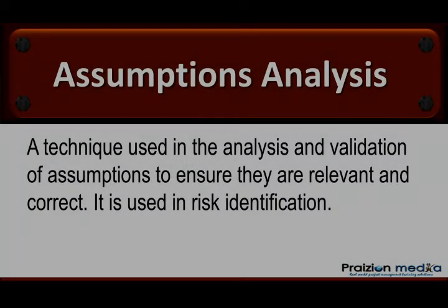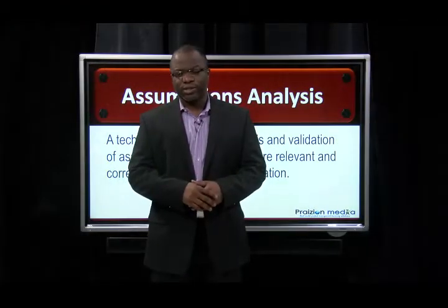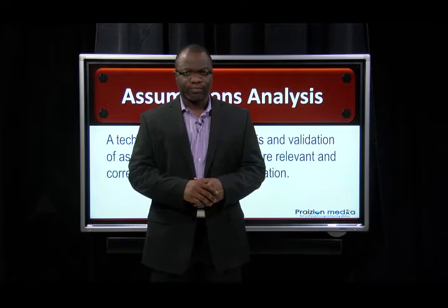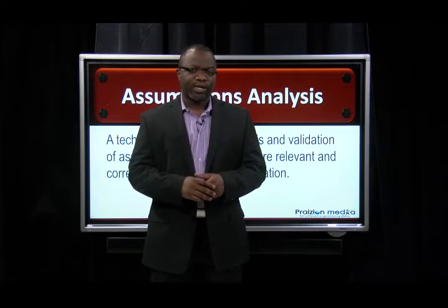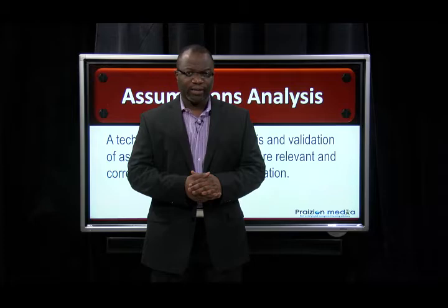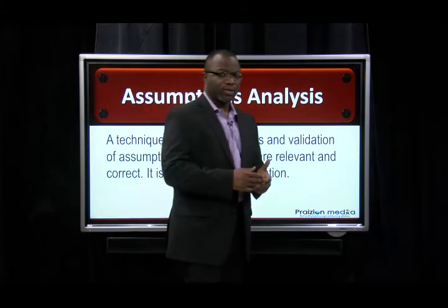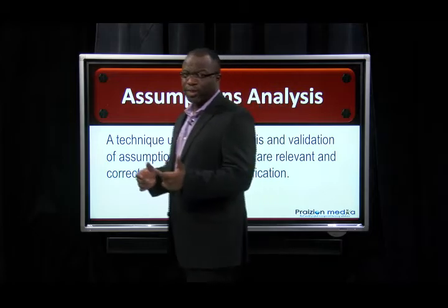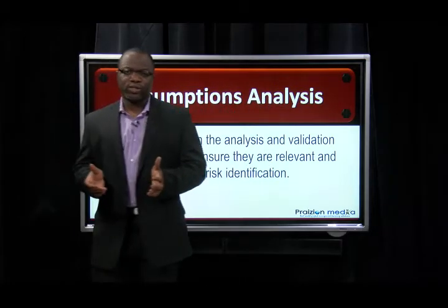Assumptions analysis. Assumptions analysis is an analysis of assumptions that are documented in the project scope statement. Remember, your project scope statement is part of the scope baseline. The scope baseline is made up of three things: your project scope statement, your WBS, and your WBS dictionary.